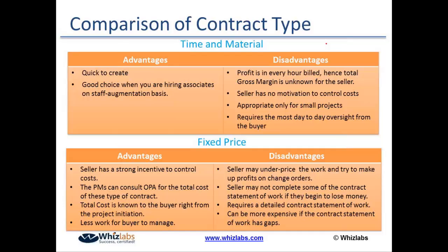The seller has no motivation to control cost, and that's why it's appropriate only for small projects. It requires more day-to-day oversight from the buyer to ensure that the seller is not sitting on my project and the project is actually progressing. We have to set concrete deliverables to ensure that the project is moving.